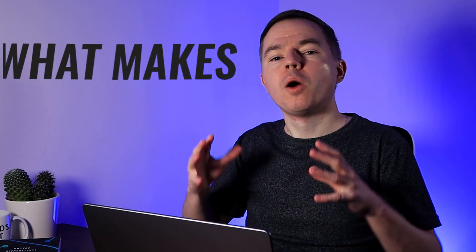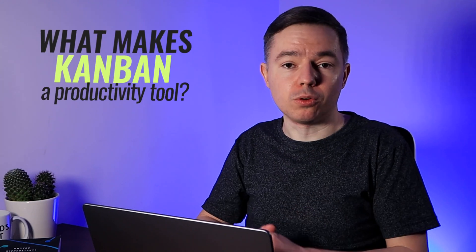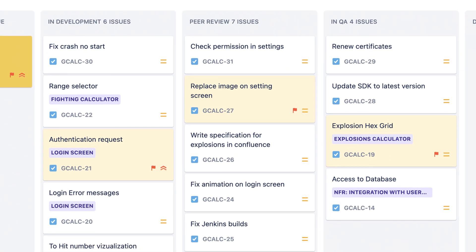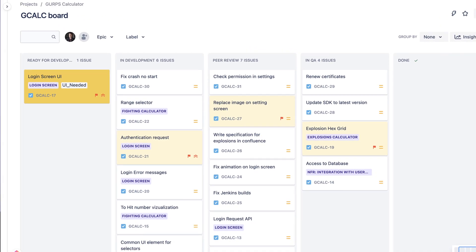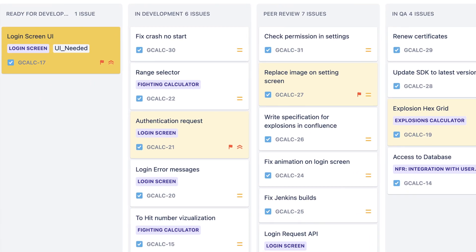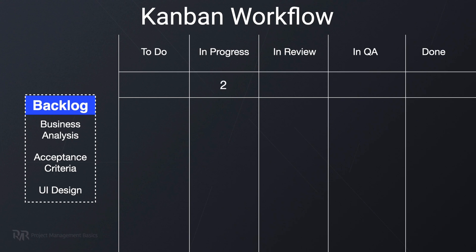Now we'll discuss what makes Kanban a productivity tool. If you just create a board and start moving tickets on it, it will quickly become a total mess. Urgent requests will appear and people will start working on several tasks in parallel. Some will forget to move a ticket through the workflow, or some tasks will be blocked. There is one elegant solution to address all those problems: work-in-progress limits. Each column on your Kanban board should limit the number of tasks that can be present in that column at the same time.